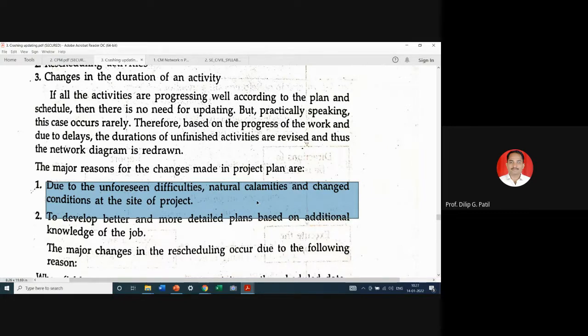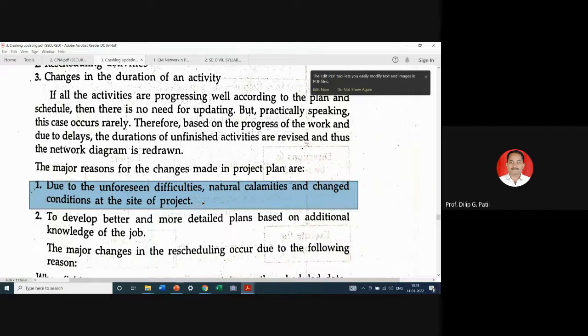जे आपण प्लॅन केलेलं आहे की 10 डेजमध्ये एक्सकॅव्हेशन कंप्लीट होईल, it may take 15 days because dewatering is needed, drying condition is also required. So accordingly, due to all these aspects or some unfortunate accidents or unforeseen difficulties जे आपण आतापर्यंत इमॅजिन केलं नव्हतं किंवा प्लॅन मध्ये कन्सिडर केलं नव्हतं, अशा भरपूर गोष्टी येतील आणि त्यावरून आपल्याला आपल्या प्रोजेक्टमध्ये काही बदल करणं अपेक्षित असतं. I will explain it with some of the photographs from the sites also.